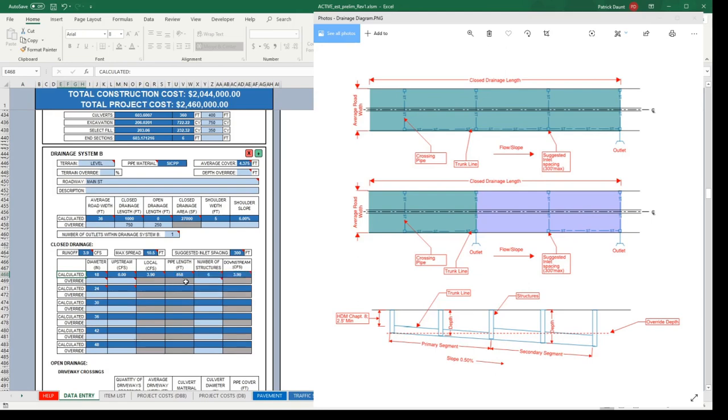And just to clarify, the crossing pipe length is just 36 feet. So 36 times 3 plus that linear length we had come up with for the initial sizing is what this 858 feet is. So at first stab, this looks pretty good, just as if it was all completely proposed.